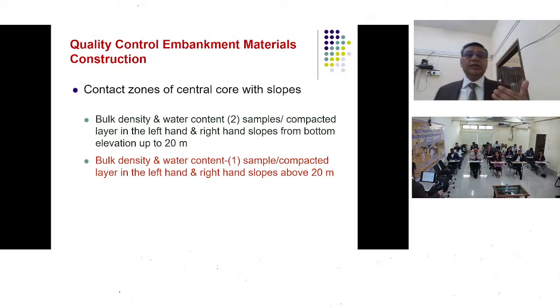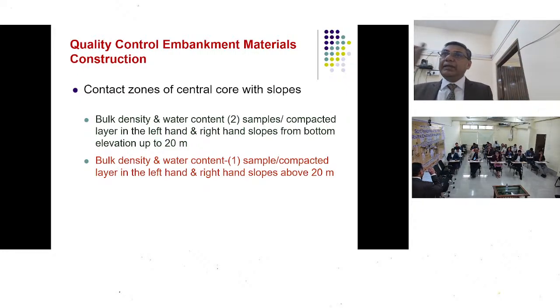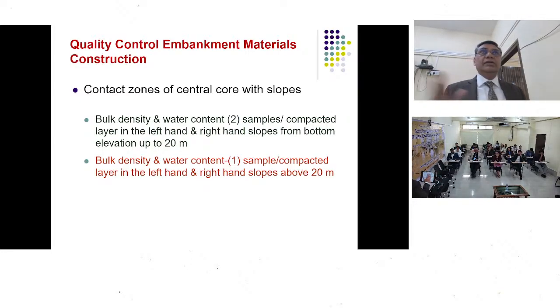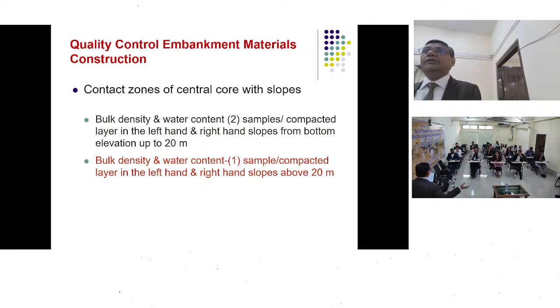So this is how things happen, because by that time the QC people have also gone. The dam is complete, it's nearing finishing, and only the instrumentation people have come into the picture. Those are the places, or times, where errors get created. So that is important. And one more thing which our projects are really missing is the handing over of things.